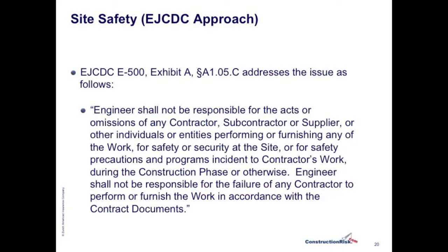The EJCDC, for example, deals with it as follows. Quote, "The engineer shall not be responsible for the acts or omissions of any contractor, subcontractor, or supplier, or other individuals or entities performing or furnishing any of the work for safety or security at the site, or for safety, precautions, and programs incident to the contractor's work." So that is the way that the EJCDC explains it, stating right there, very clearly, that the design firm is not responsible for the safety and security of the site.